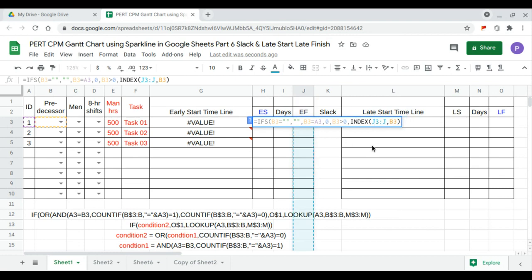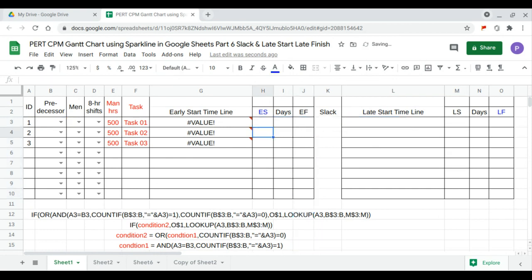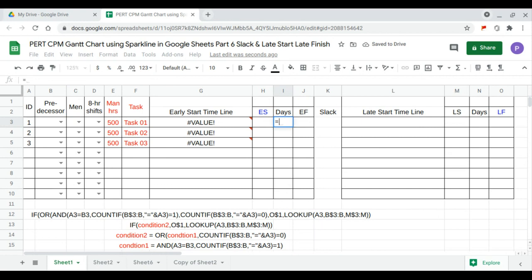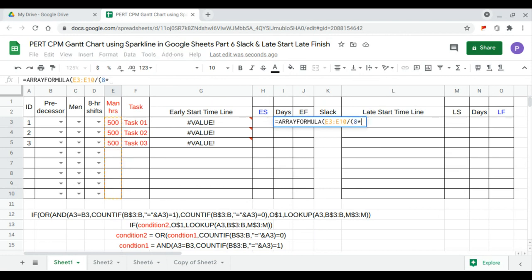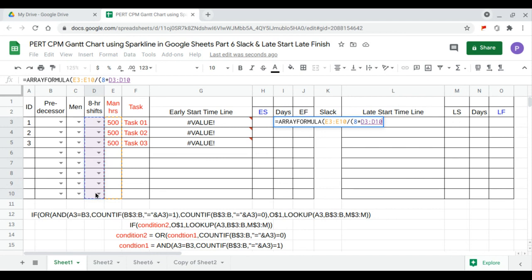We lock the reference on the end day (finish day) range because we're dragging the formula downwards. Now we drag this formula down for the first three tasks. Next is the duration in days — an array formula: man-hours divided by eight times the number of shifts times the number of men.